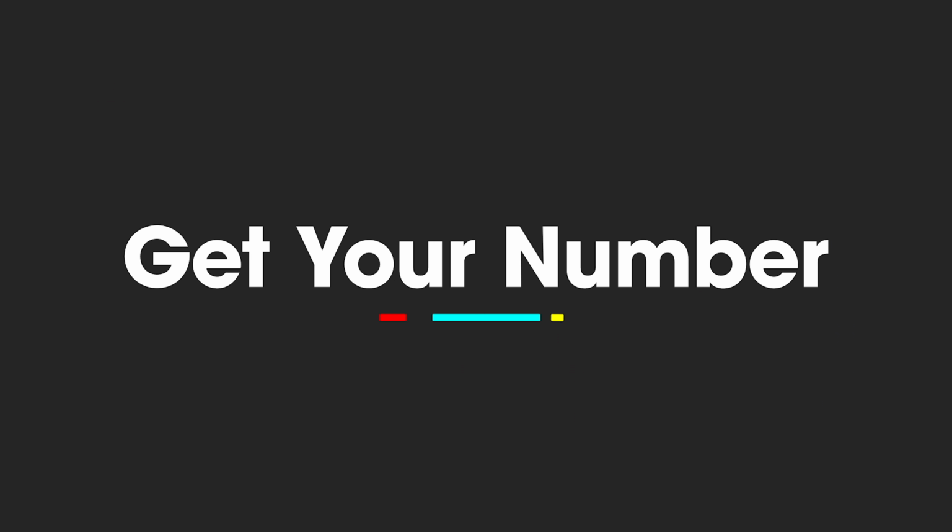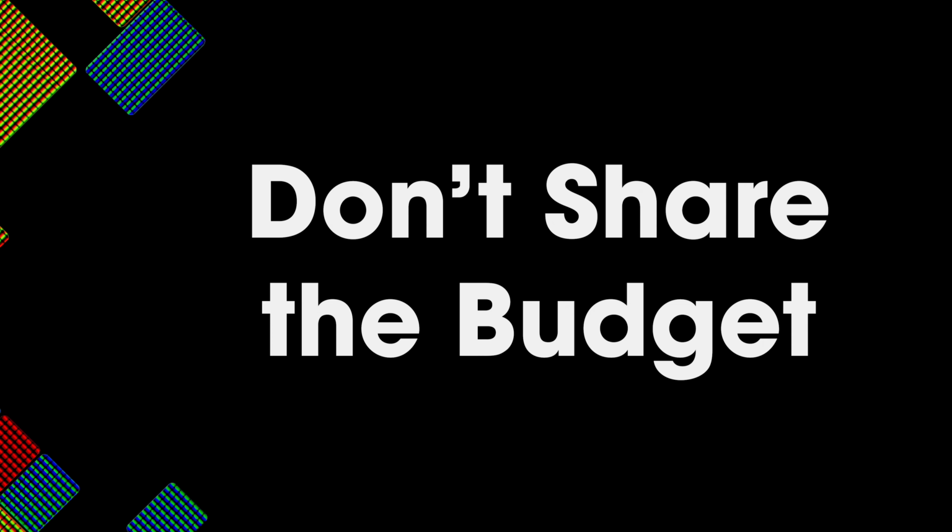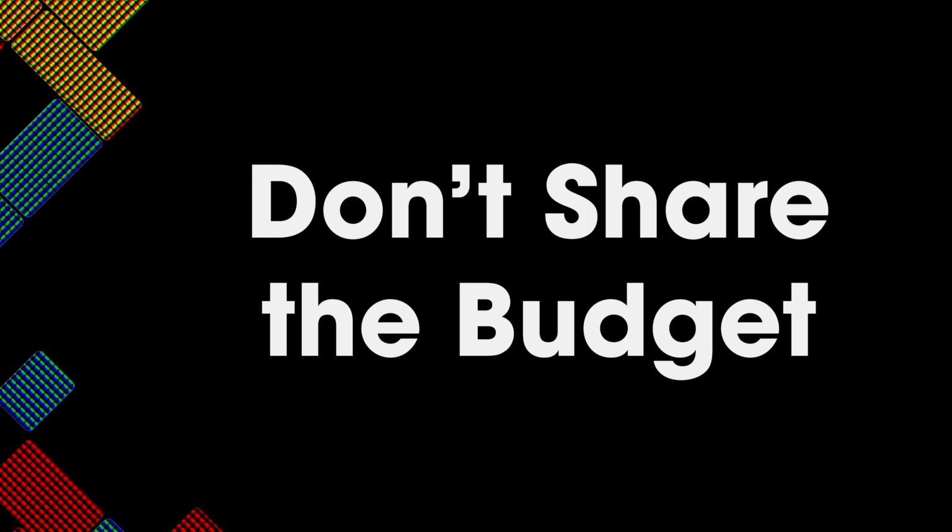The first number you need is the budget cap from your line producer. Sometimes they can get a little weird about this. They may give you a number to stay under, or they may not. If they do, the number they're giving you is their cap on post and has been arrived at with relative consideration for all the other production costs. If not, they want you to come up with a number and still land underneath the mystery number in their head. A quick note about budget numbers. If the producers do trust you enough to share the budget numbers with you, treat this as sacred information. Don't share it with anyone or it won't happen again. Now, whether they did or not, this takes us nicely into step 2.